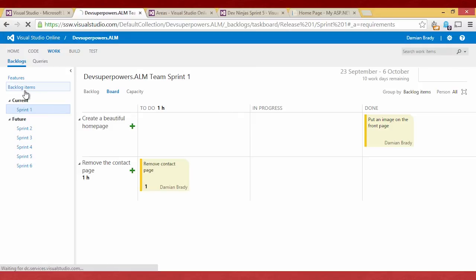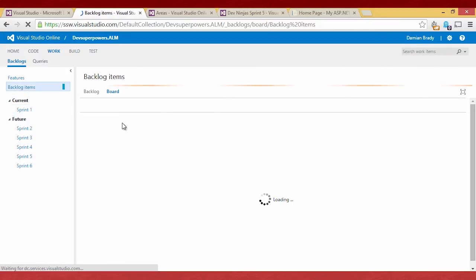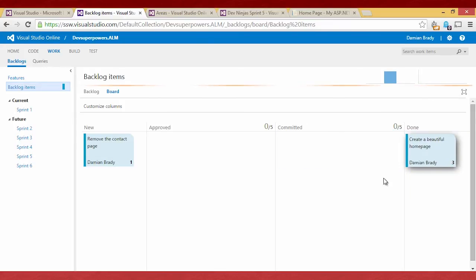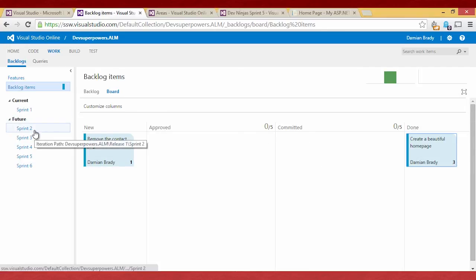What that doesn't do though is set our backlog tasks. So with the backlog we can still see that that's committed, but we need to drag that to done to get that to complete completely. And it's not bad that it does this. The backlog is generally good for identifying which things you've done during a sprint. So at the end of the sprint you can go through and say, are all the tasks under this guy done? Yes, great, that one's done, let's move on. If they're not all done, then you can move that backlog item into the next sprint to prepare for the next bit of work you're doing.